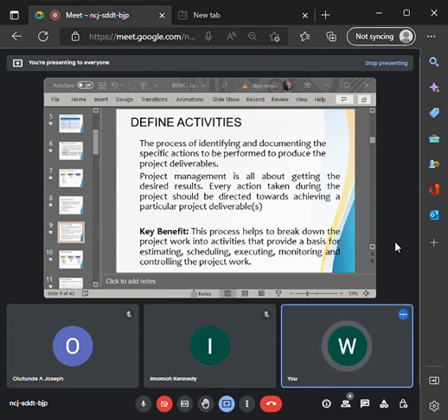Somebody came and did the mapping of the room, cut out. Somebody else will come and dig. Somebody else will mix the granite and concrete, cement and sand together. Somebody else will have to go and pour it. Somebody else will do the blinding. Somebody else will now put block and begin to raise the block. You can see different tasks that need to be done just to perform the foundation. So all those different tasks are what we refer to as defined activities.